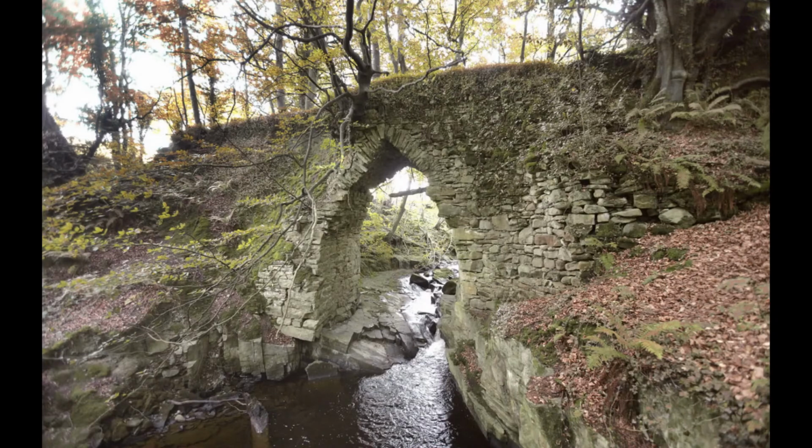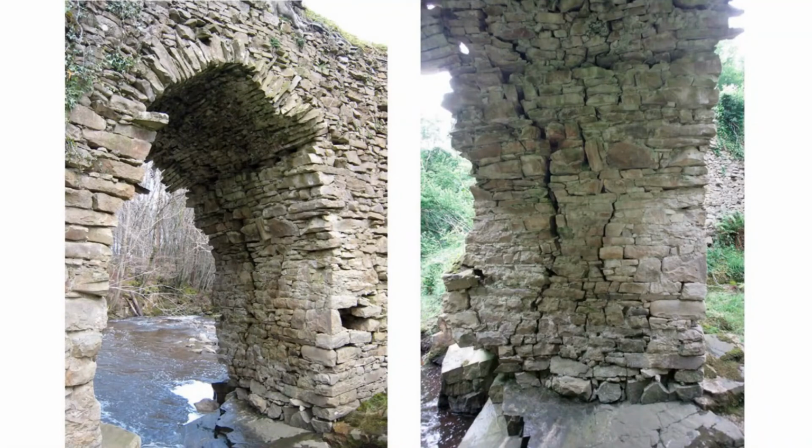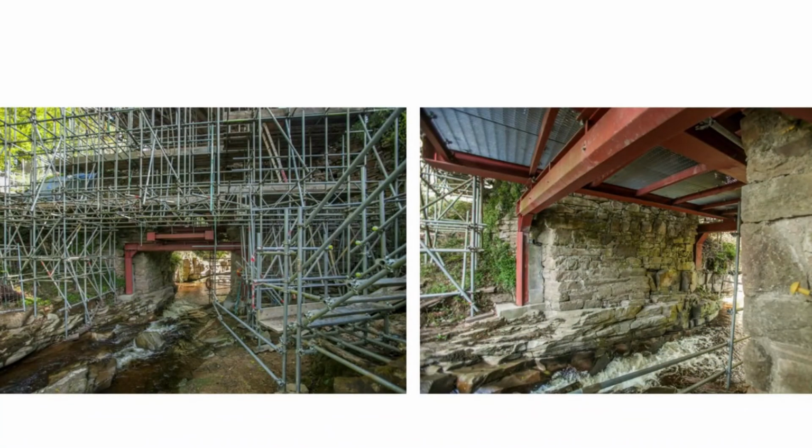When undertaking a major structural stability project of one of the few remaining examples of a medieval bridge in Ireland, Cadamstown Bridge, County Offaly, we were able to draw on the expertise of our in-house structural engineering colleagues and work with us on a project to save the bridge from collapse. They were able to advise on the structural propping of the structure in advance of works, but also advise on the necessary masonry stitching, the stabilisation of the wall faces, and so on.